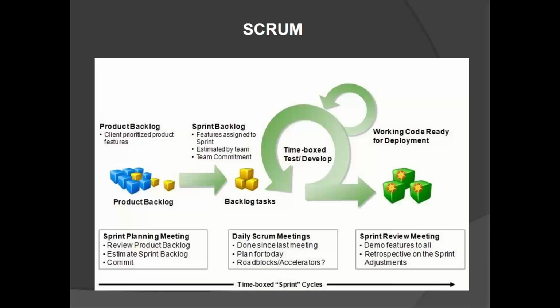Scrum meetings are nothing but daily 15 minutes, and we are going to discuss only 3 points in these 15 minutes. What are those? What you have done in the last scrum, have you faced any obstacles or problems, and what you are going to do in the next scrum. If the time extends beyond 15 minutes, we are going to call it the 16th minute meeting. In the 16th minute meeting, we can discuss anything.